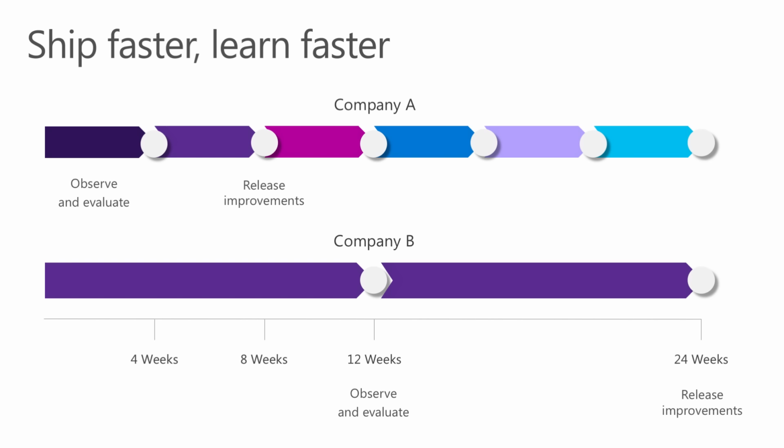Meanwhile, during week 8, Company B is still in development of the first version of their app. They won't learn about this highly requested feature until after their first release during week 12, a month later. Eventually, Company B garners the same insight and adds Android Pay to their app with the second release, which ships in week 24, a full 16 weeks after Company A launched the feature. During those 4 months, Company A was enjoying 40% more revenue than Company B. In fact, Company A started to earn revenue 2 full months before Company B even shipped, and they shipped the 6th iteration of their app by the time Company B shipped their second.